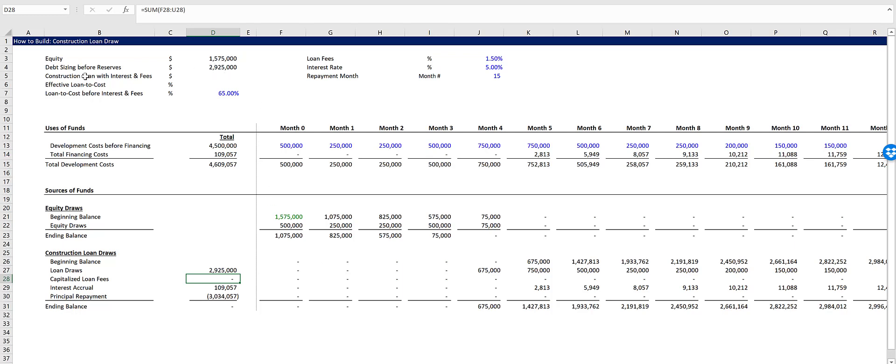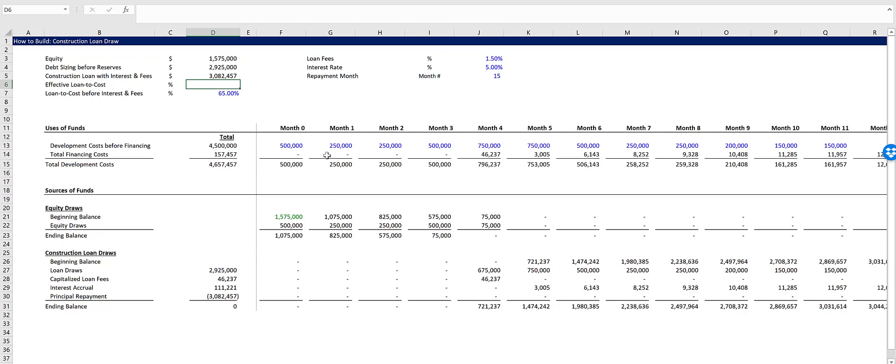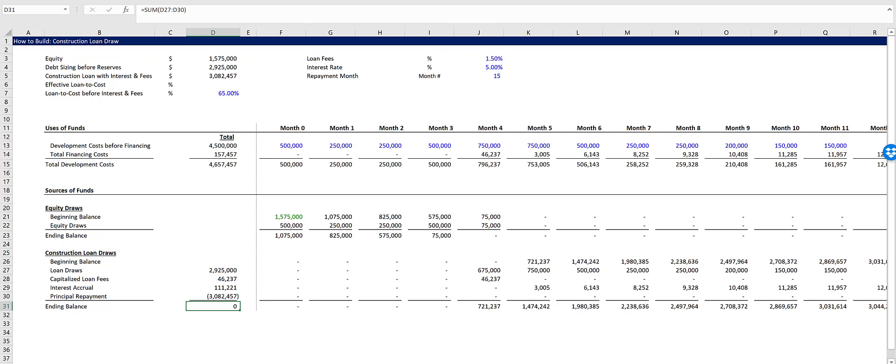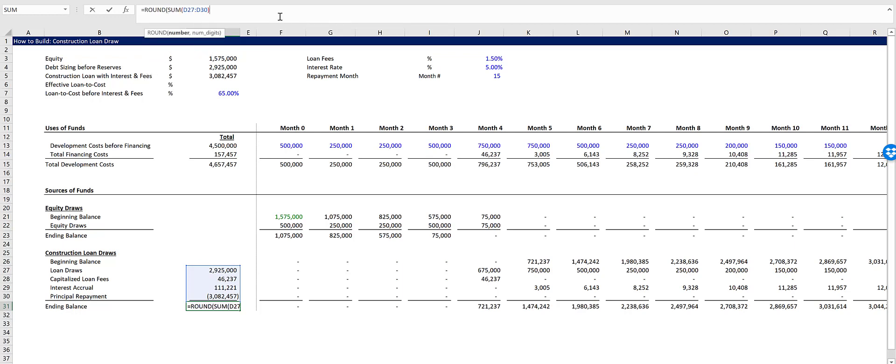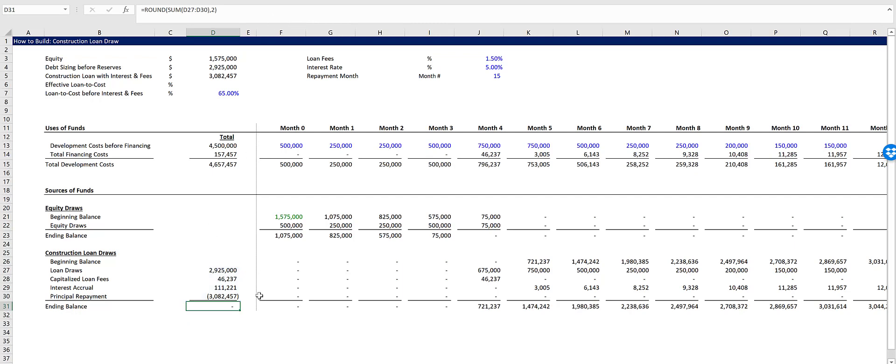So here's what we're going to do. We're going to take our construction loan with interest and fees, which will be the negative of the payoff amount, because that's the total amount we need to borrow with interest and fees. And you'll see it goes up because the capitalized loan fees are now included. And this number right here returns a zero, even though it's formatted as accounting, which means there's some very small decimal located in this number. So why don't we just round this to two decimal places and this back to zero? That often happens with circular references. It'll get close, but not perfect.